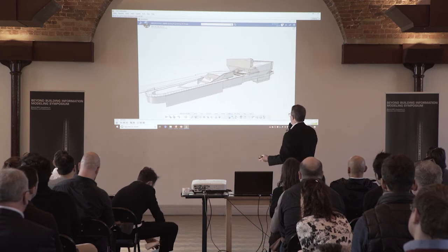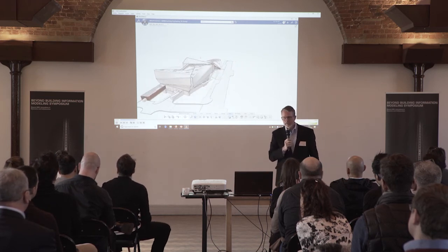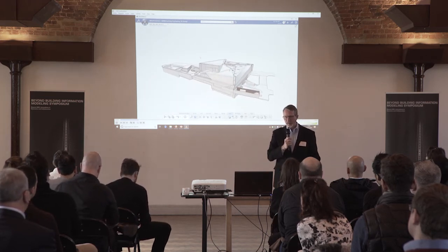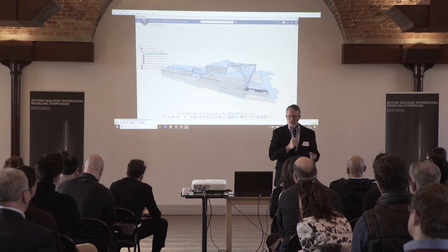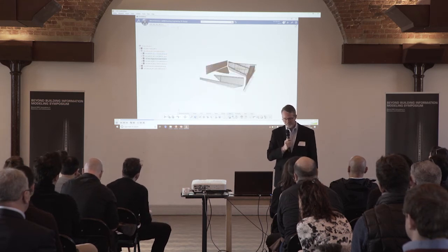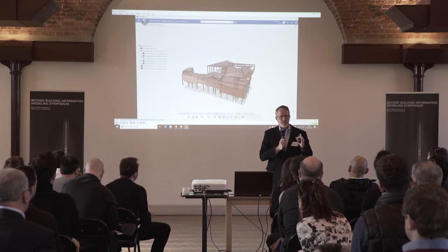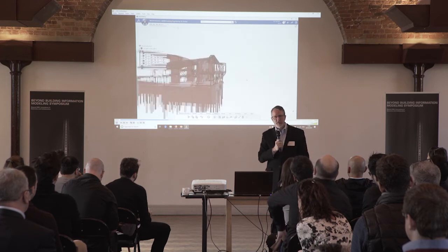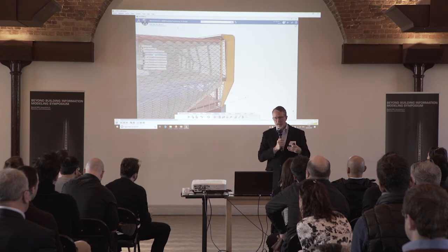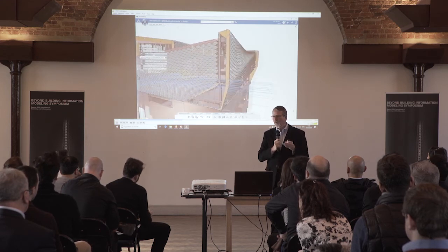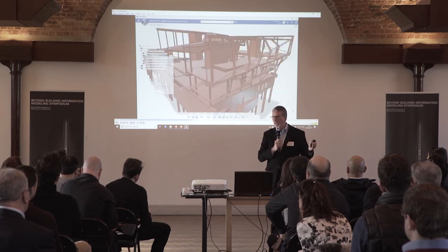Okay, so here you see what looks like a traditional BIM model, but it's a lot more. It gets all the way down to the fabrication. It understands the primary structure, secondary structure, and the facade systems. More importantly, as we get into construction on this project, on the Olympic Museum, we did laser scanning throughout construction. What happens with some of these facade systems is accumulated error as you work across the building. There can just be minute differences in the attachment points between primary and secondary. But as these accumulate, you've got to know what the current state is of the installation in the field, and can you make a change in the factory for the panels that are being shipped.